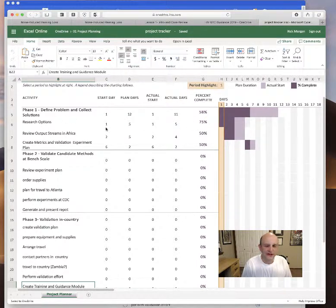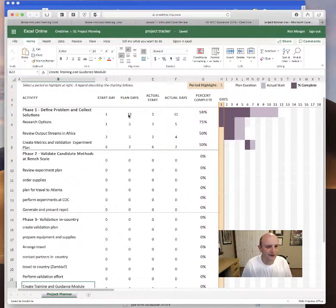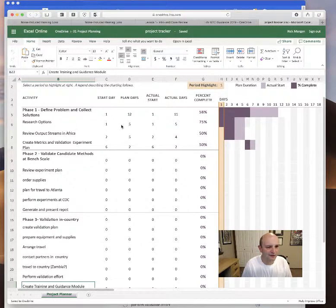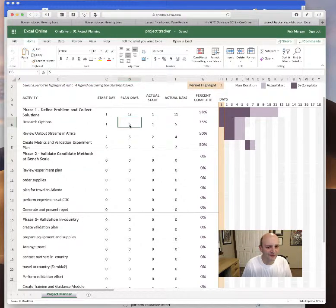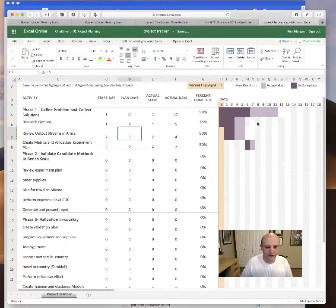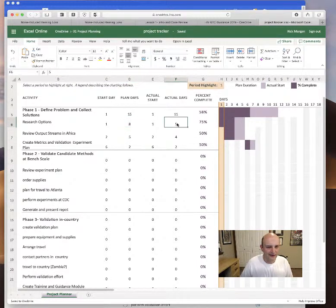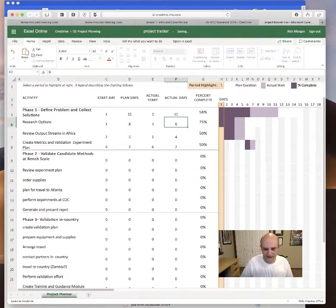These are the start day. I don't have dates, I just have the day into the project. So for example, this is how many days we think it will take for research options. If I thought that would take eight days, I put eight here and you'll see this little bar gets longer.